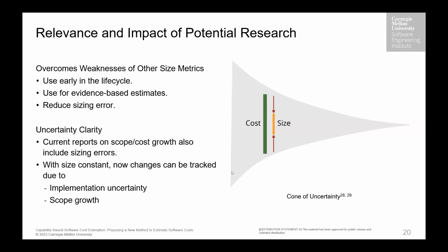you can also group your existing data based on these capability types. In my PhD dissertation, which I don't talk about here at all, one of the things I did was I looked at function points and compared IFPUG and COSMIC function points. And I found that each one behaved differently in different types of software groups. So IFPUG performed better in one type, COSMIC performed better in another. And so now with that kind of information and with these groups, and using that to create groups in your data set, you could actually make your estimates even better because now you're having similar types of projects and using, for example, your function points for similar types of projects, and that will give you a more accurate result. So in a way, yes, but hopefully I understood your question correctly.